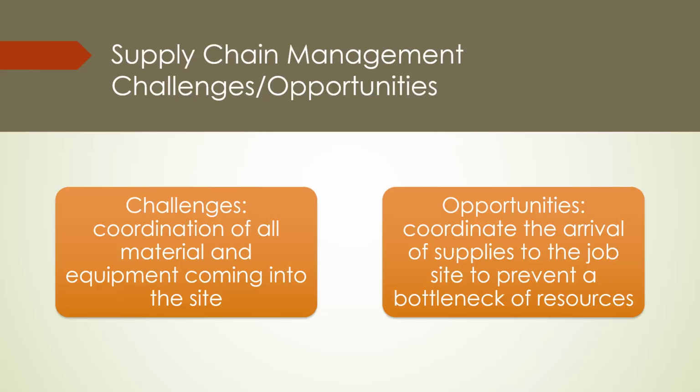If there are problems with the concrete delivery, or their capacity is limited due to conflicting requests from other customers, then this could cause delays, and that will result in a domino effect for the overall building project. So the opportunities come in and can offer advantages for construction firms. The supply chain should be integrated to allow for the coordination of equipment and supplies entering the construction site.